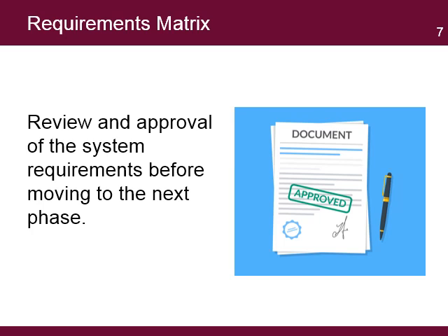The requirements document needs the approval of the project manager before moving to the design phase. The approval has the purpose to confirm that all the important requirements have been captured and that they are complete and accurate. It also provides the project manager with the opportunity to ensure a complete understanding of the requirements and that the requirements document can support a detailed design of the proposed system.